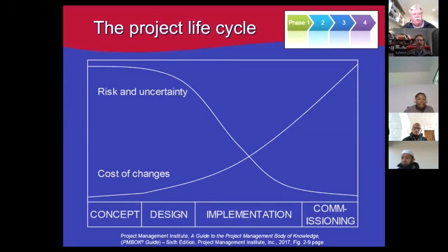Well, as is clear from the graph, as the life cycle progresses through the project, you've crystallized a lot of the unknowns, and your cost of changes are becoming more and more committed as you go along. In the beginning, in your concepts, as you pointed out in your example in the harbour project, you have a major influence on the costs, and there's a lot of scope for change at this point, where you can change designs which have a major impact on the costs.